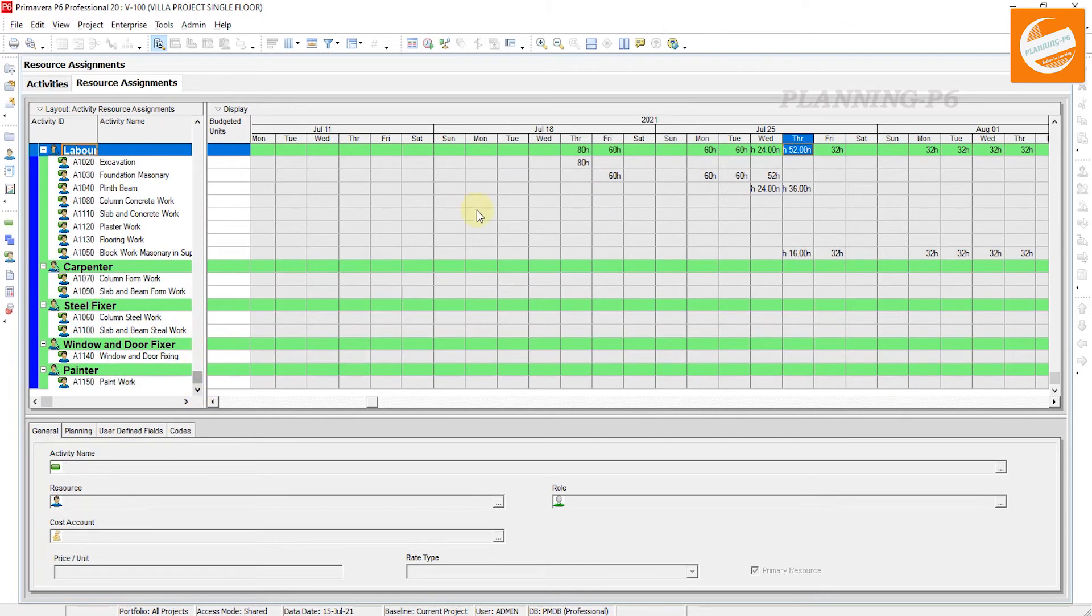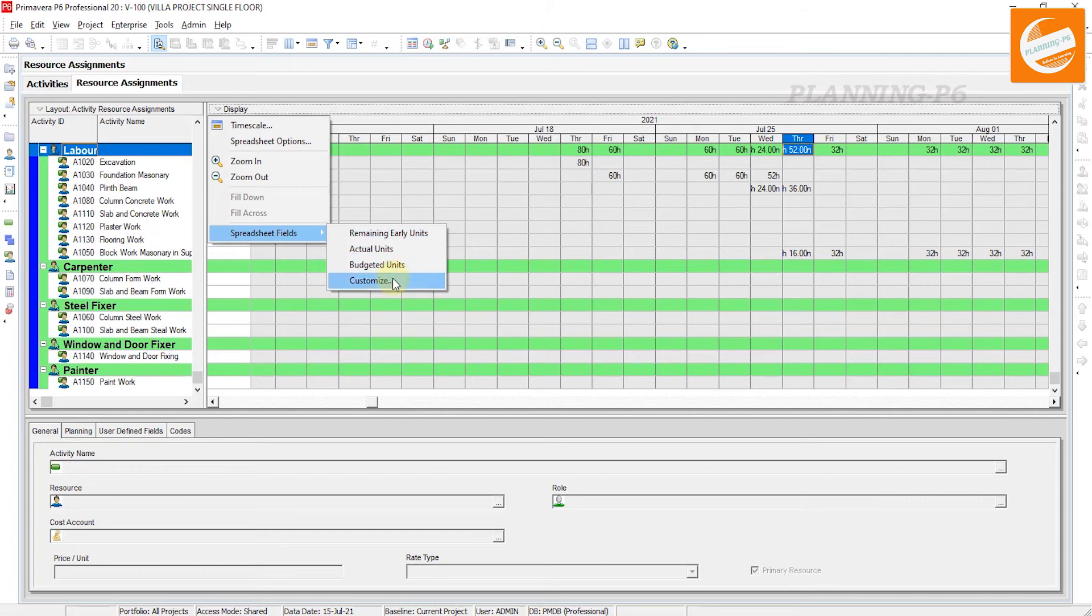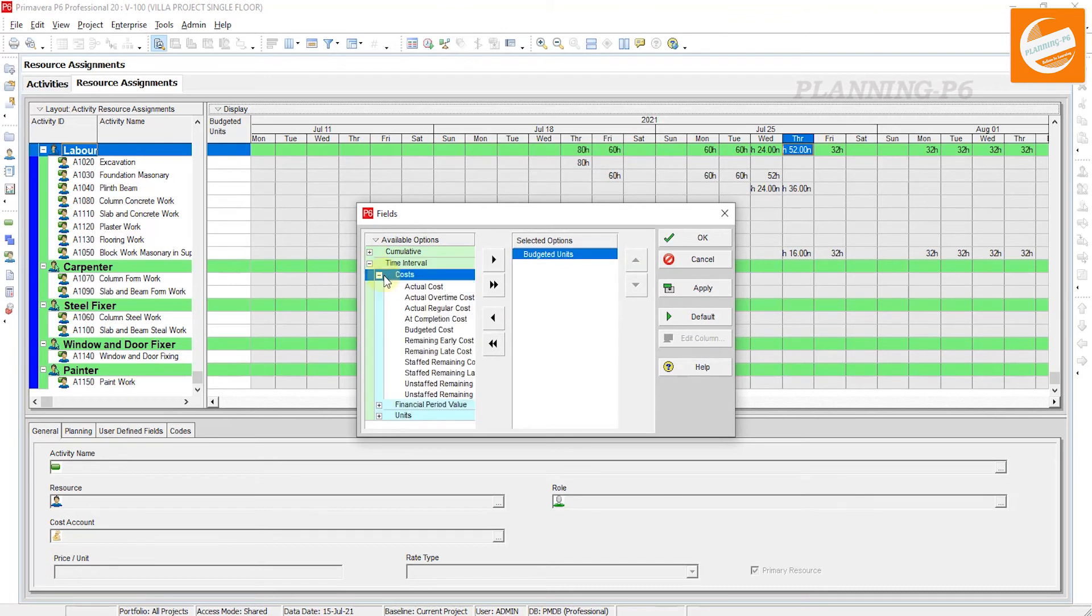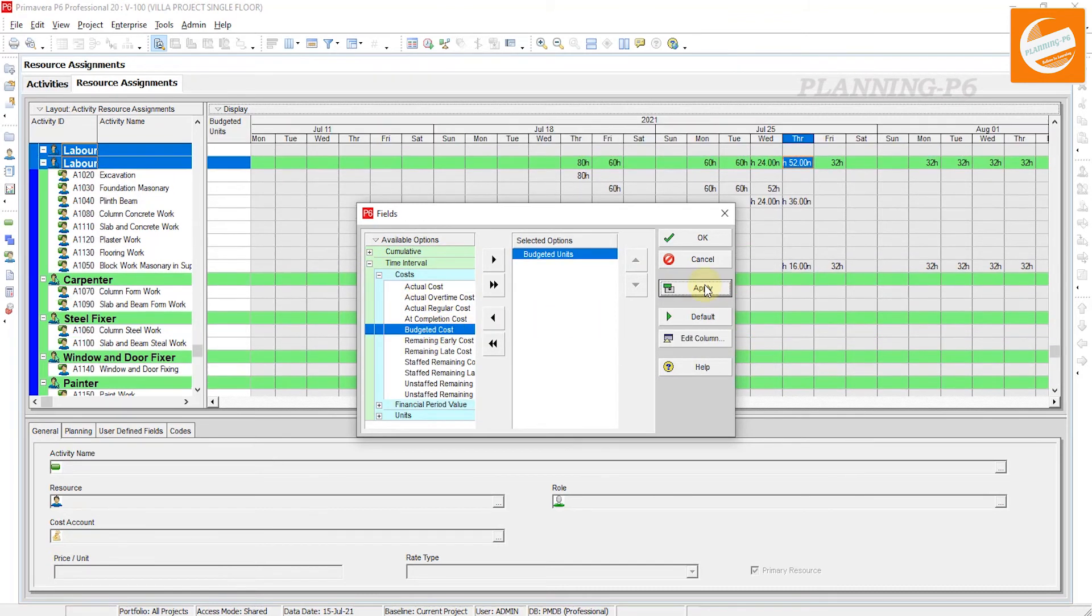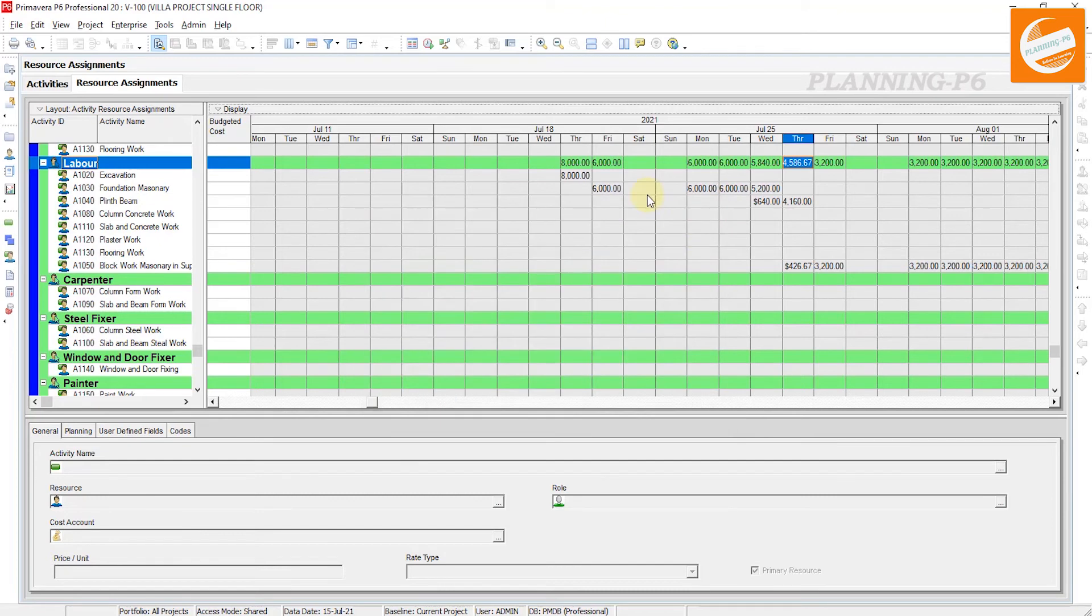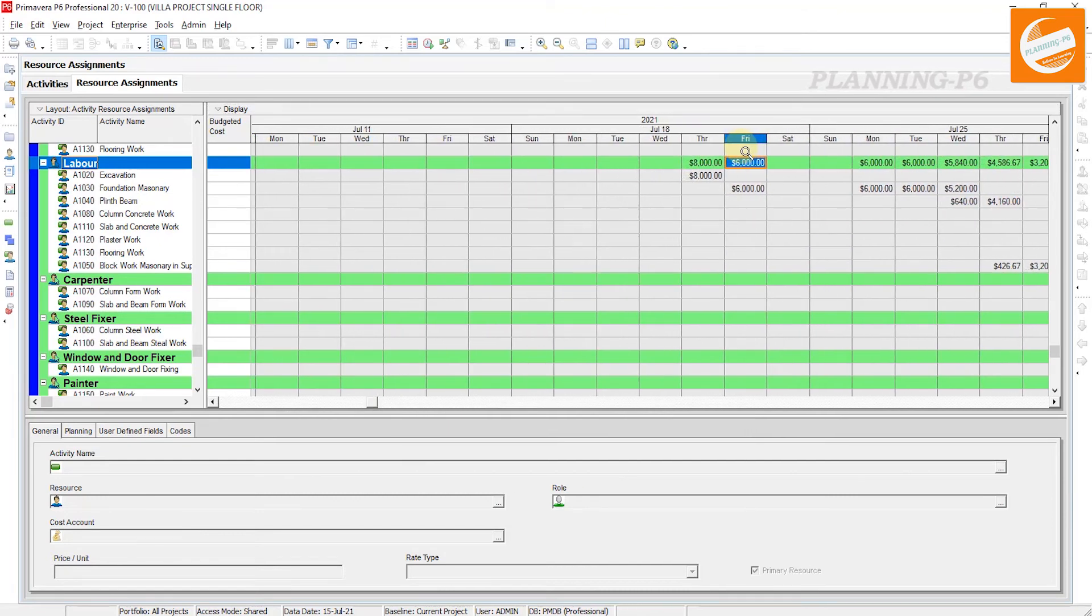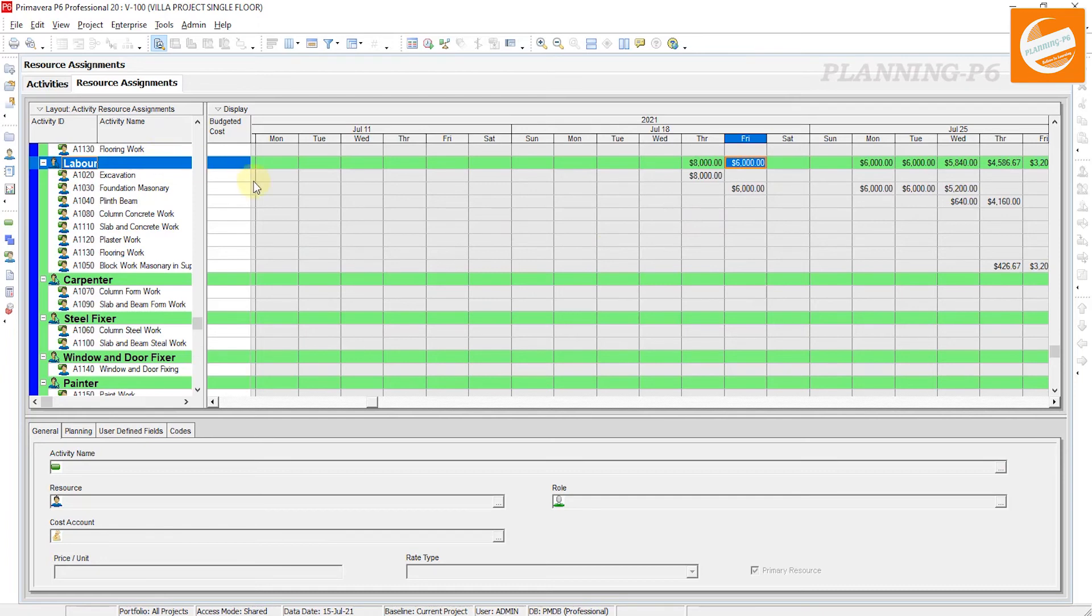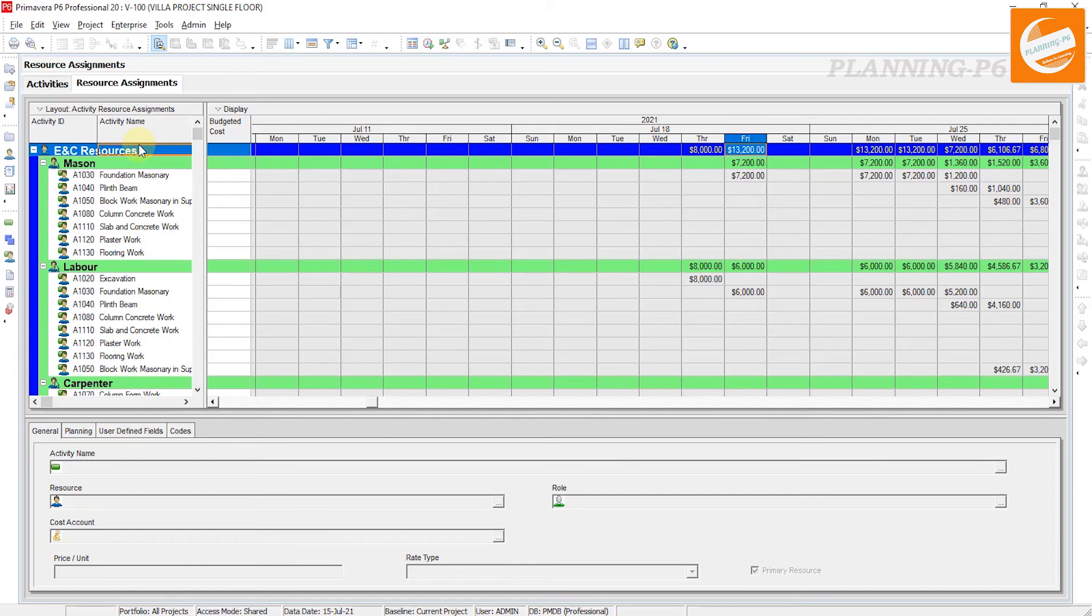Then if you want to see the cost here, go to Customize Time Intervals Costs. Apply Budgeted Cost and remove Budgeted Unit. Apply, OK. Now you can see your budgeted cost in dollars, in your currency as you wish. And you can copy these all and paste to your Excel sheet.